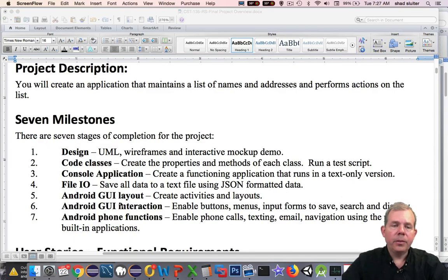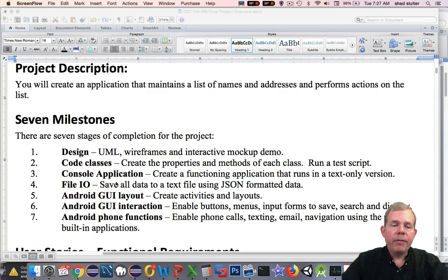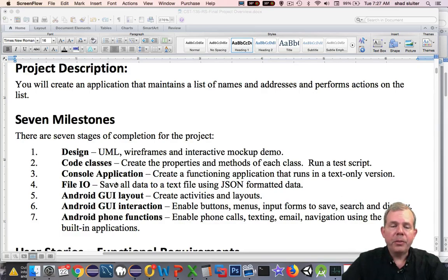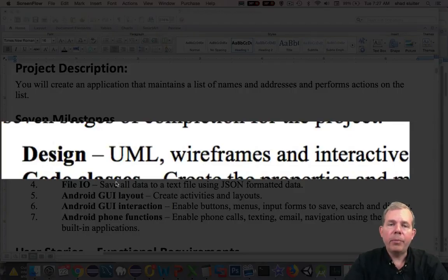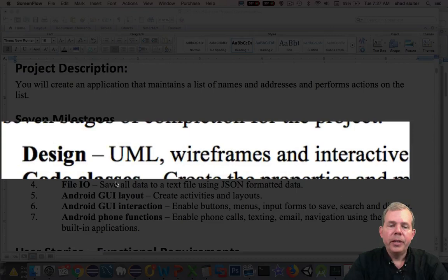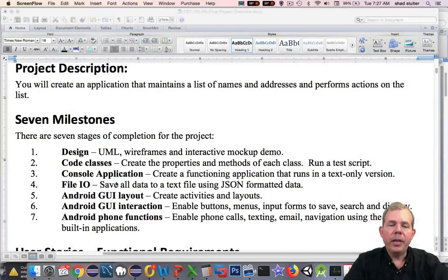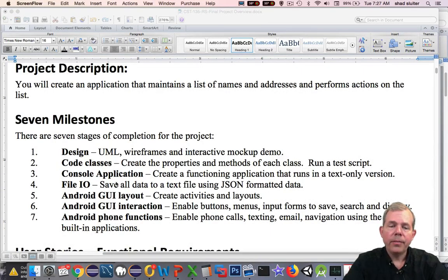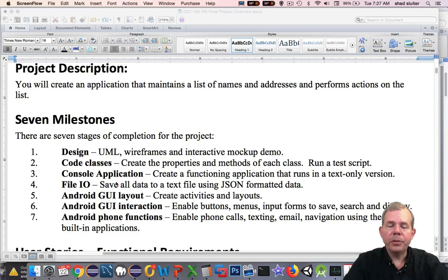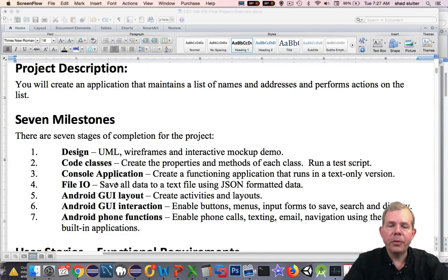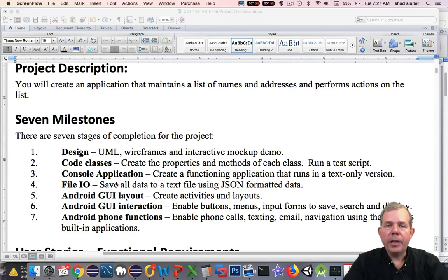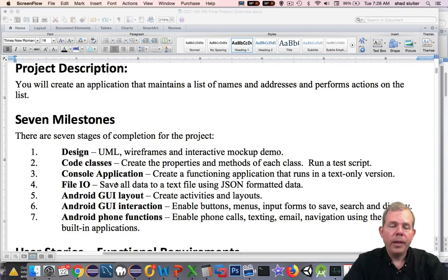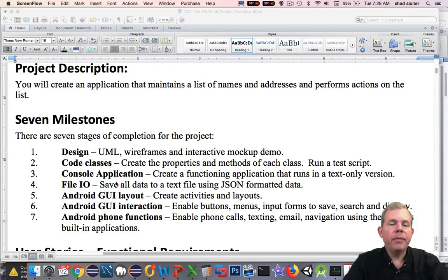The milestones that we're going to be doing are seven. The first milestone in what I'm going to show you in the next video is how are we going to design our application. So we will create a UML, a diagram that shows our classes. We will create wireframes, which shows all of the screens drawn just in a rough draft pencil form. And then we will work with an interactive mock-up demo so we can test out our application on an actual screen and see if we're missing anything.